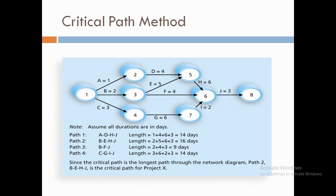The second tool is the Critical Path Method (CPM), used for predicting the earliest time by which a project can be completed with minimum delay or float. This is done by identifying the longest path and its duration in the network diagram, such that all necessary tasks get completed. In the diagram, the path B-E-H-J has the maximum duration of 16 days and is therefore taken as the critical path, ensuring all other activities are completed and the project finishes successfully.